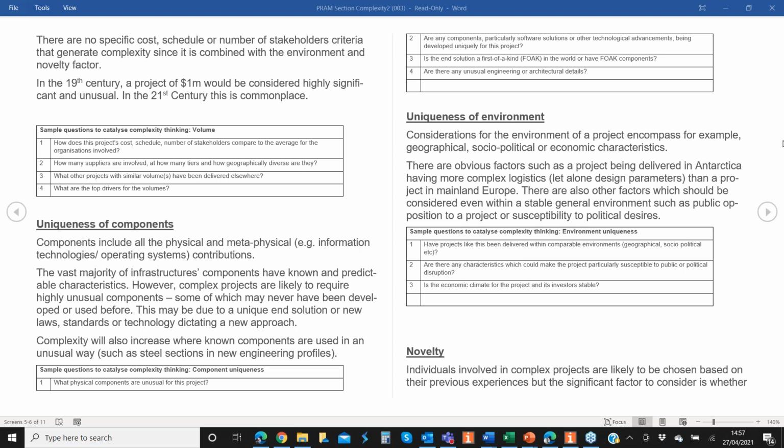Well, certainly if we can, I mean, it's interesting. We're alluding here to the bow tie being one of those simple approaches. It doesn't really work for complexity because it assumes a linear relationship between cause, risk, and effect. So I was interested if anybody's got any sort of diagram that we could use to illustrate complexity operating in a more complex way than bow ties.